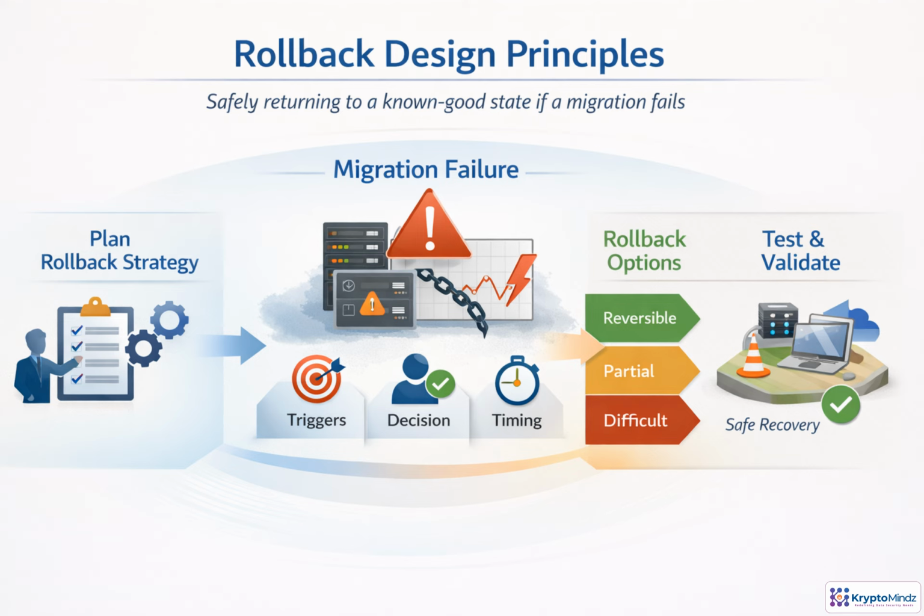Classify changes honestly: fully reversible, partially reversible, or hard to reverse. Then practice the rollback in a pilot or sandbox. The goal is not just to undo a change. It is to prove the service has returned to a known good, validated state.